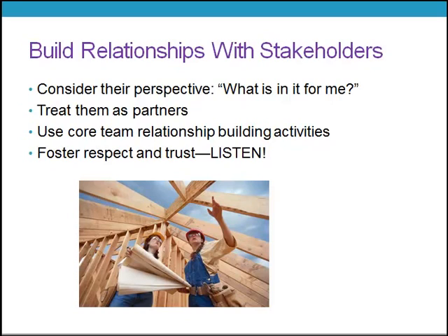You'll want to understand their perspectives and try to mitigate the negatives for each of them. It's important to realize that stakeholders also can be internal, say a functional manager who is in charge of one of your team members, or external, a supplier of materials for your projects.